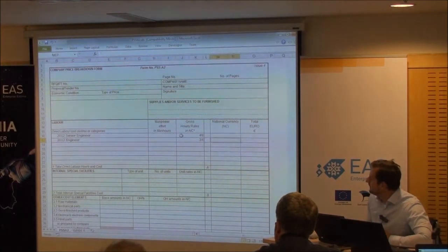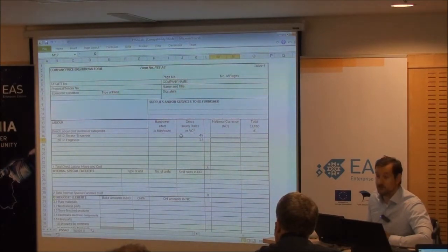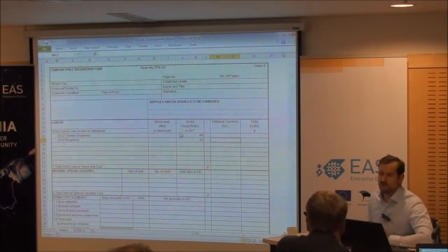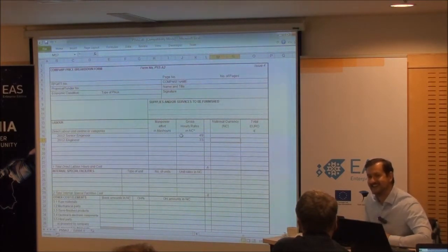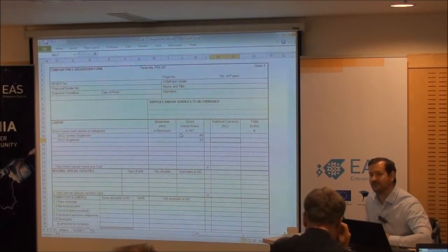So if you're doing a very big deal and you've got a subcontractor with a large proportion of that, do ask them if they're taking cover. There's nothing worse than picking a nice subcontractor in Britain and he's bid that but he's got a tight margin because you pushed him a bit. He's not giving himself any cover on the currency exposure, and it changes. And now he's into loss. Chances are he's going to start backing away, not answering your emails as rapidly because his management are pressurising him.